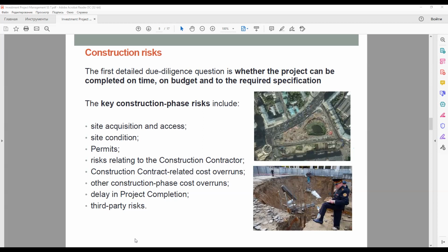Rights of way and easements may be difficult where this involves parties not otherwise connected with the project, and the construction contractor is unlikely to take the risk of obtaining this. Lenders will be uncomfortable if these are not obtained prior to financial close.